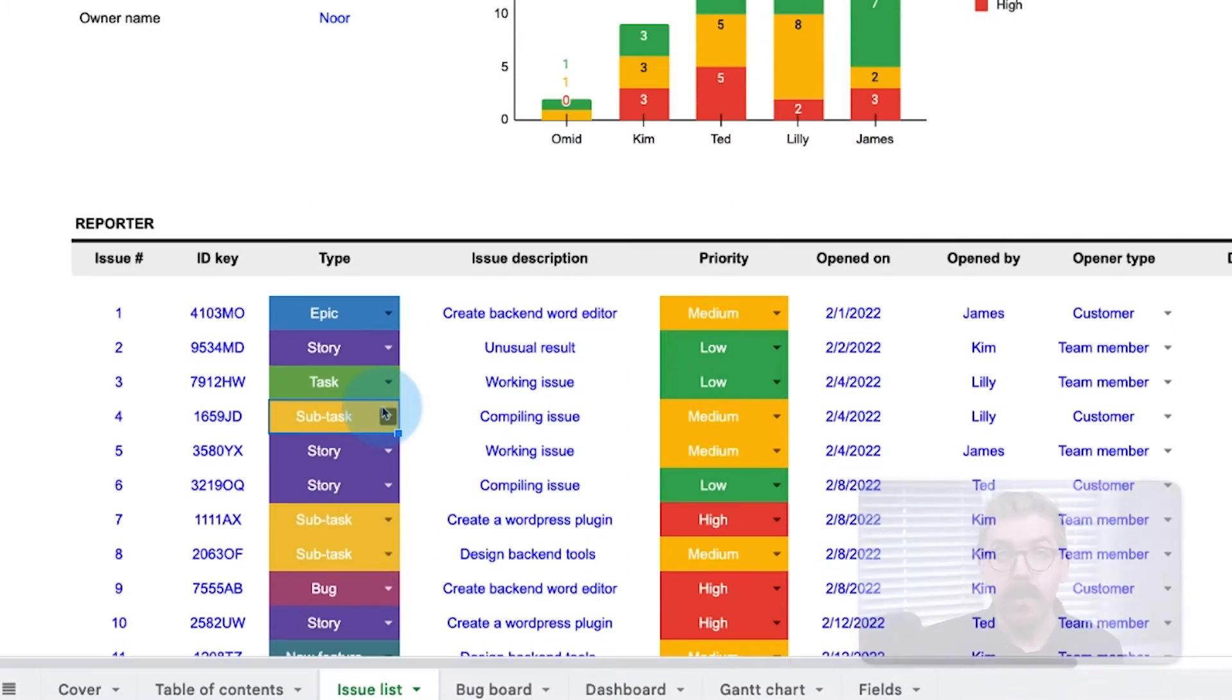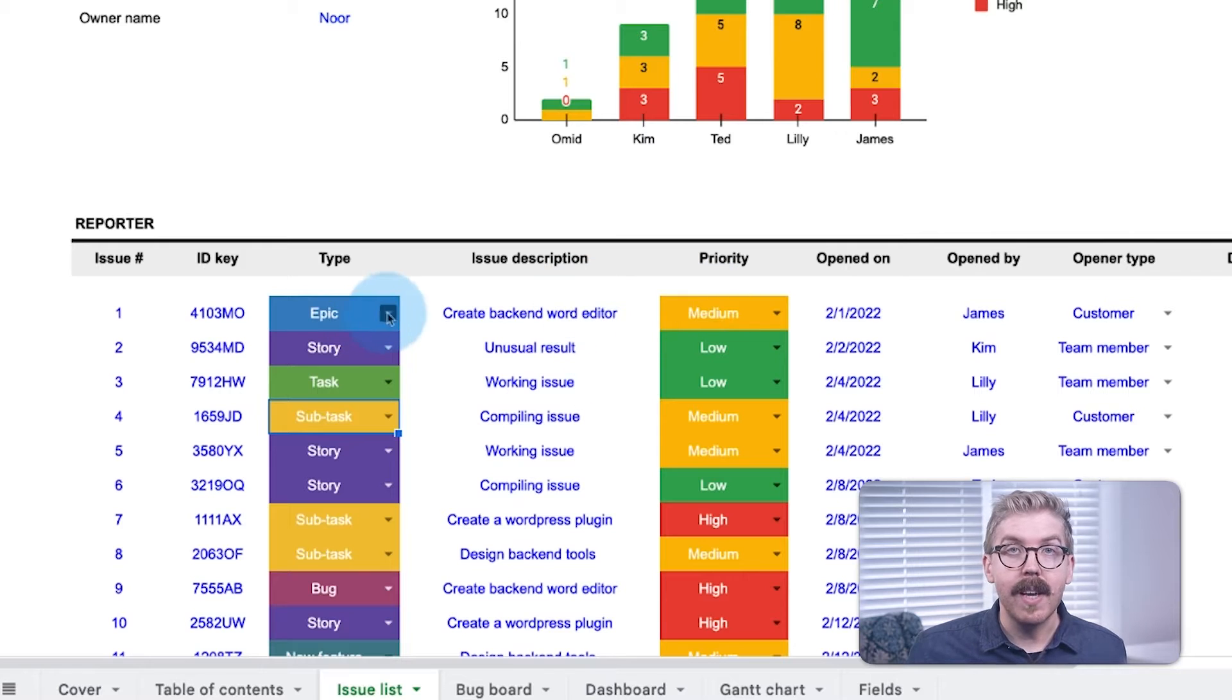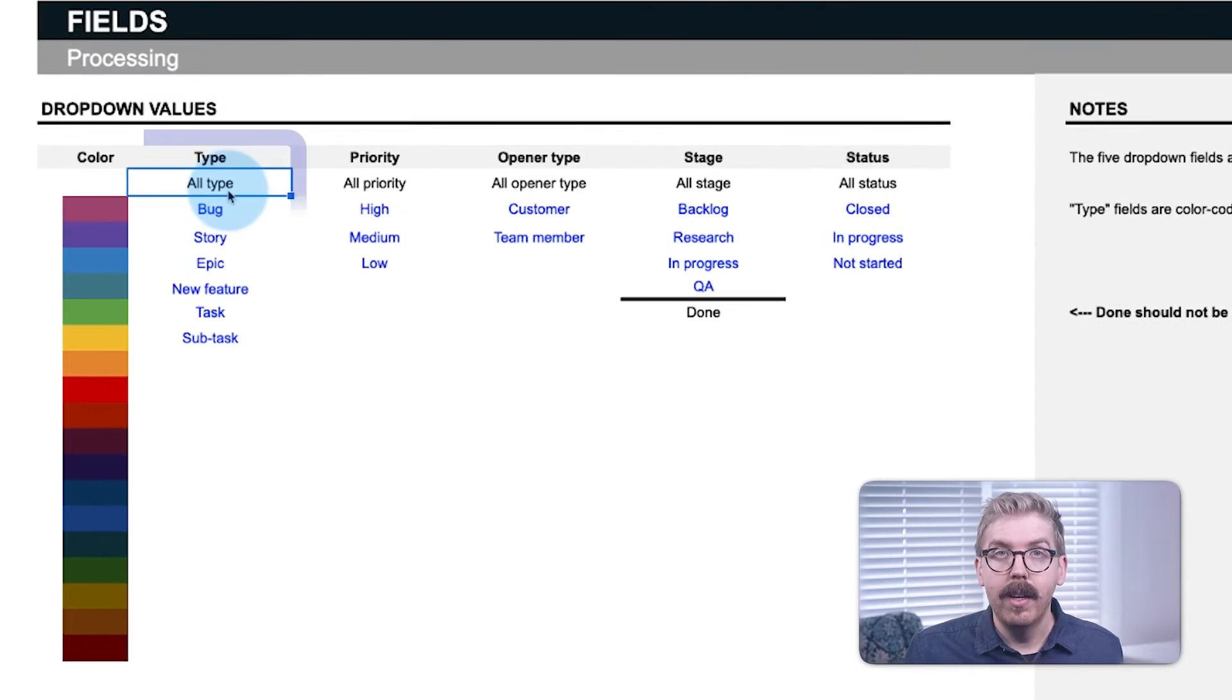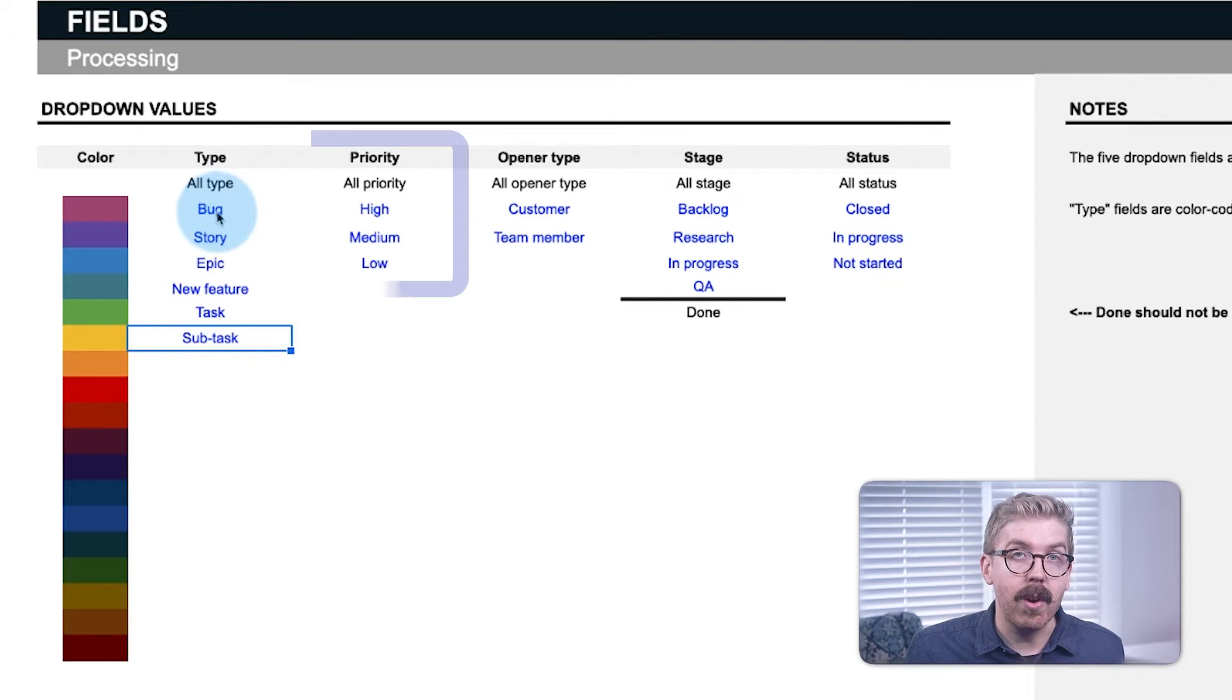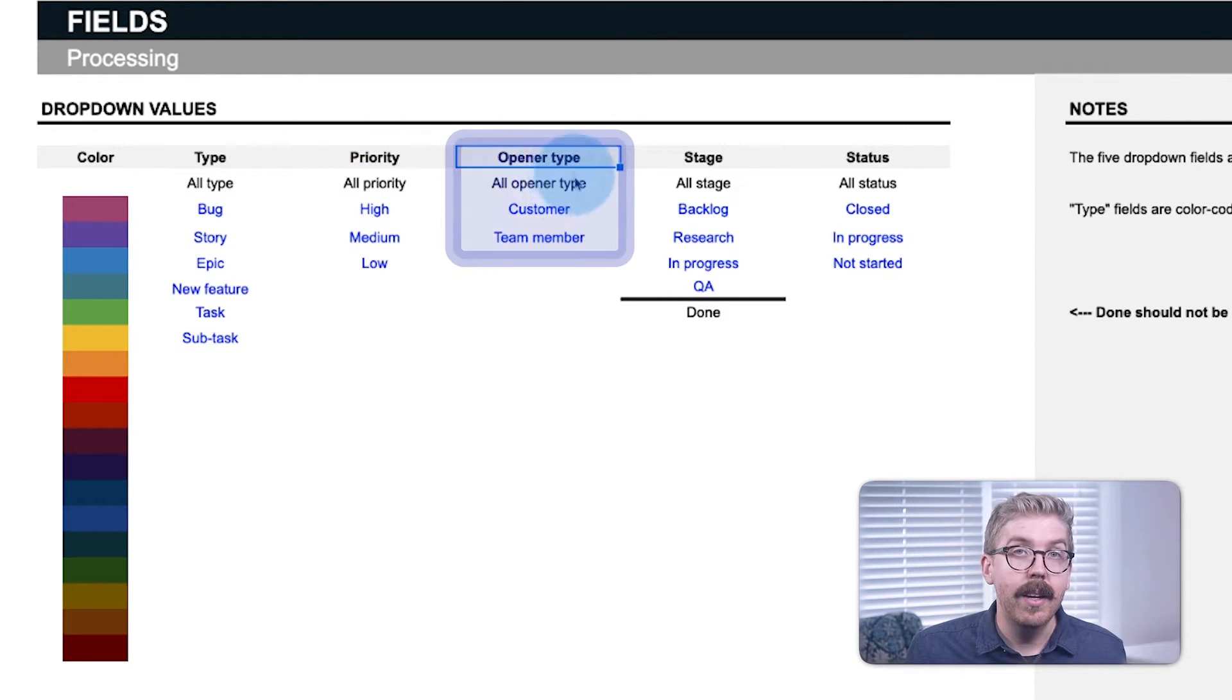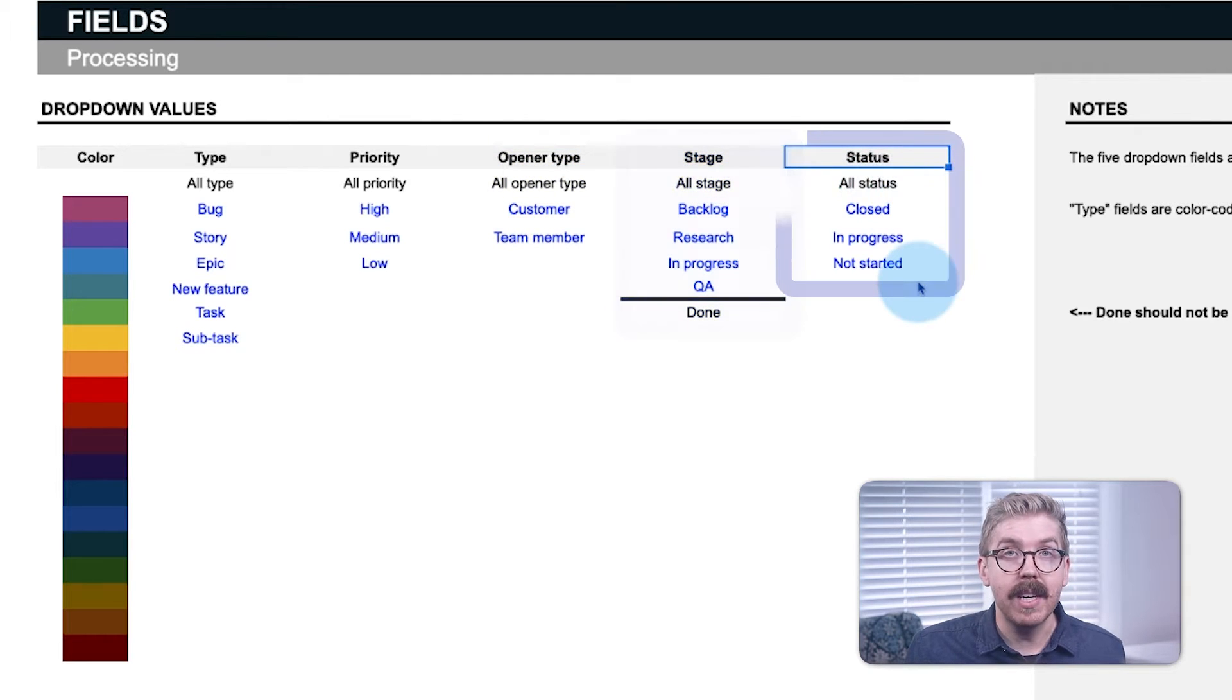Your Issue Tracker list should sort issues by type. In our example, we define these inputs in the Fields tab here. Your Fields tab should also define the priority levels of your issues, who can open a ticket, the stages of your workflow, and the status of tickets, i.e., issues.